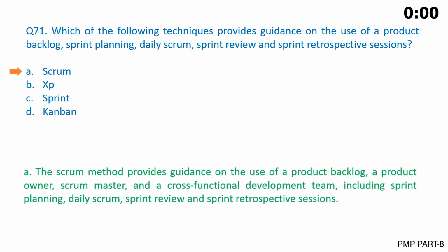The correct answer is A. The Scrum method provides guidance on the use of a product backlog, a product owner, Scrum Master, and a cross-functional development team, including sprint planning, daily scrum, sprint review, and sprint retrospective sessions.